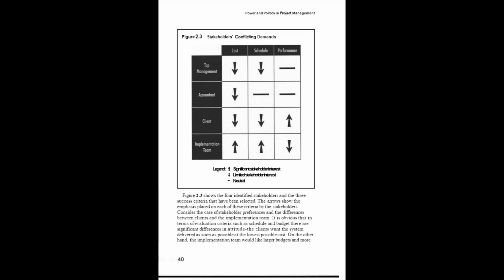As a result, rather than seek general happiness from each stakeholder group, the true goal of project managers should be to keep everyone minimally annoyed. If everyone is minimally upset with the project manager's handling of various components of the project, time, budget, and specification, it is likely an effective balance among the various competing demands has been found.